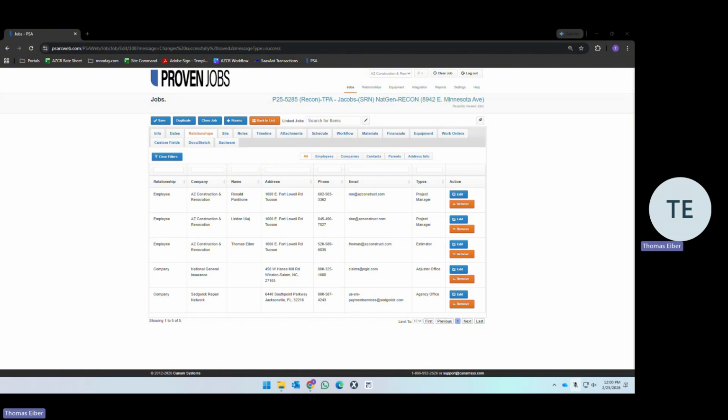Lastly, your success measure is going to be your adherence to the budget. How closely you can adhere to that budget that is set out by the estimator. If the work you're being asked to complete is unrealistic based on the budget that you provided, you need to communicate that to your operations manager, who can have a discussion with the estimator, or you can discuss it with the estimator themselves. Maybe they made a mistake on that budget and they have the power to change those work orders to adjust the margins. So allow them to do that, communicate that to them, and have the estimator change the budget. You just need to adhere to what you're given. Again, look out for unrealistic expectations, but you will be graded against your adherence to the budget.